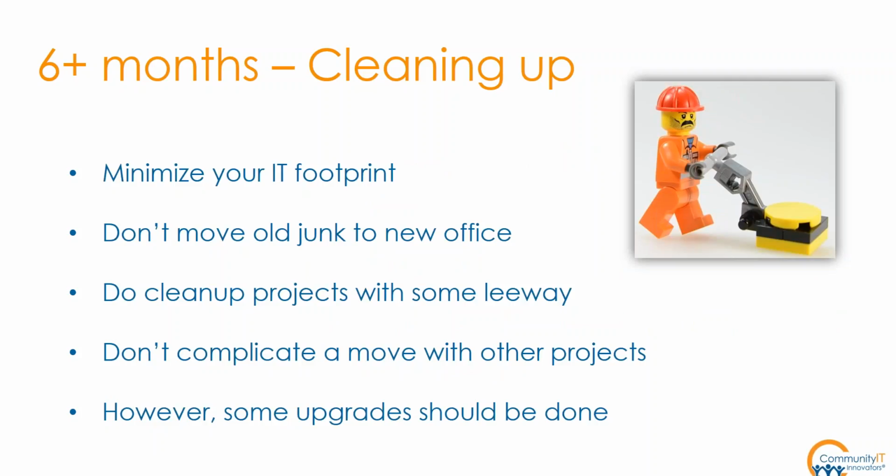Same idea, you want to minimize your IT footprint in the new office. You want to make sure you do any of these projects with enough leeway so that they can be finished and that you're comfortable with your new systems before the move, so that the move doesn't get in the way of any other projects. A lot of times, copier leases are easily switched over during the move, mostly because that's an external vendor and you don't have a whole lot of work. It's swapping one for another.